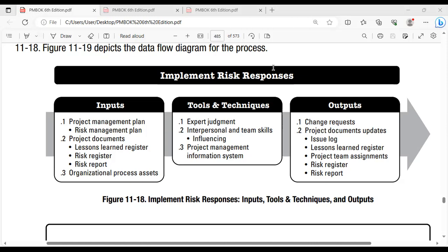Even if you want to select your vendors, you can use your multi-criteria decision analysis. You can bring some criteria, get your proposals, and give the score to find the best proposal. You can give the score subjectively, or you can give the score objectively, numerically.